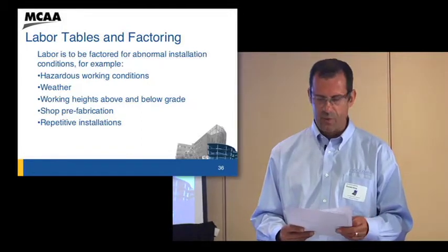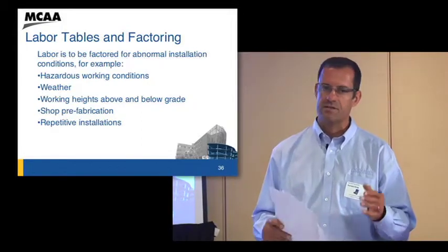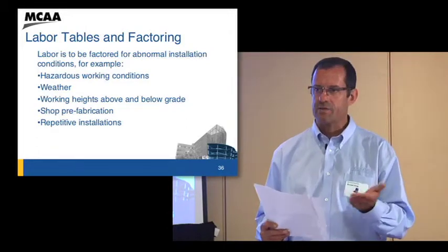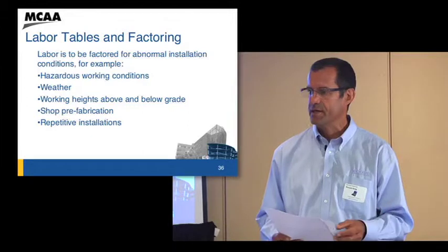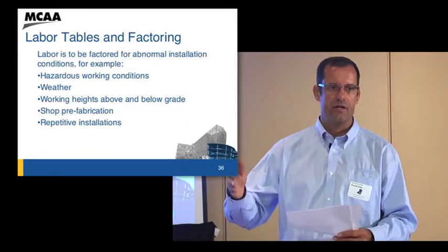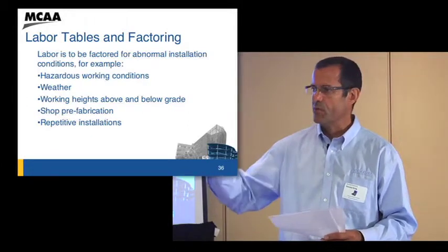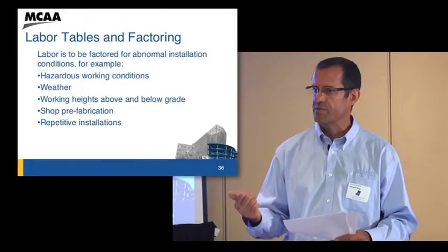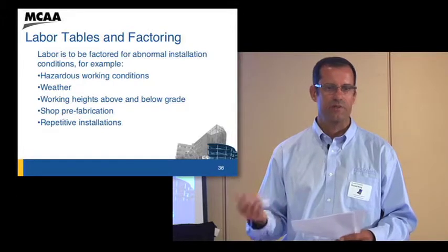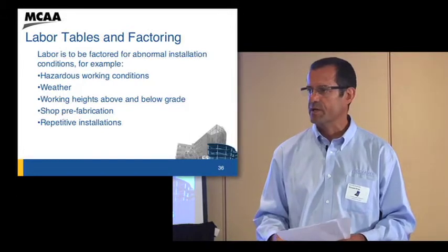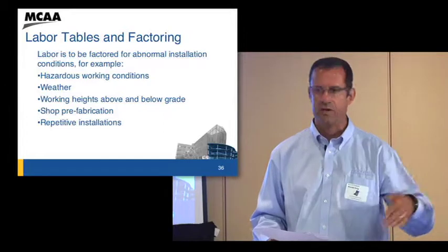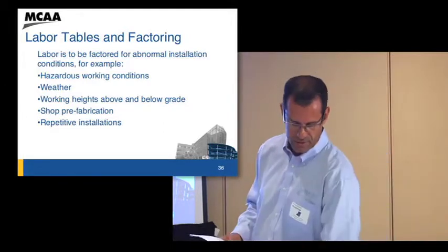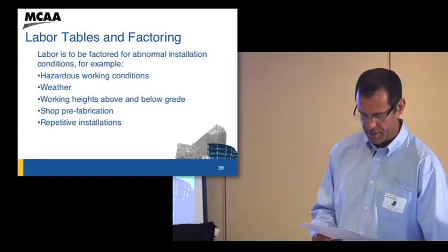Your shop prefabrication, obviously this is where you're going to be gaining hours, or cutting hours out of your estimate because you're using your fab shop. So not only are there areas that you need to add labor for height or for weather conditions, there are areas that you could actually cut labor. Using the fab shop would be one, repetitive operations would be another. The more times you put that toilet in, or whatever that item is, the more of them you had to do, the quicker the guy should be at putting it in.